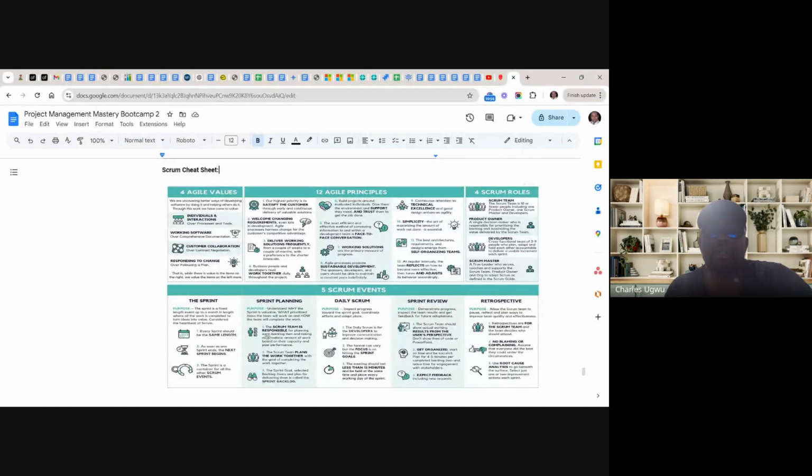And number one here says, the Scrum team is responsible for planning each backlog item and taking on a realistic amount of work based on their capacity and performance. You don't assign work. If you look at what we've been doing in Waterfall, the project manager assigns, like in Freight Camp, you see the project manager or the team lead assigning work to team members.